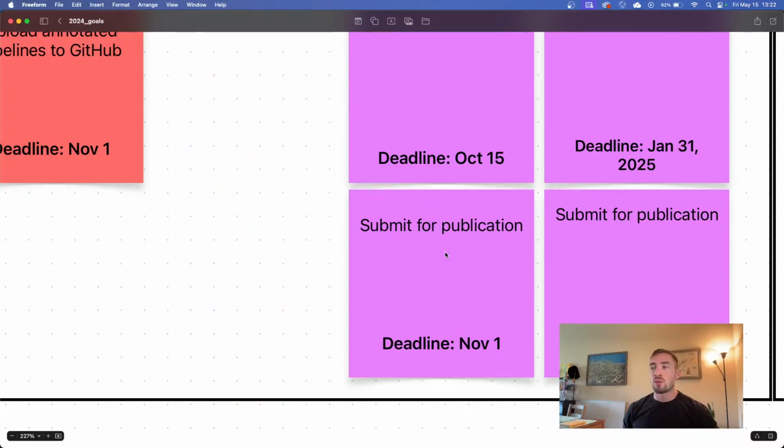But what's great also about deadlines, if you start the planning process early enough, is you can adjust as things go. Once you start diving into the tasks that you have, then you can realize, oh, that was too much. There's no way I'm going to be able to do it. And you can adjust accordingly. If they are hard deadlines set by a grant funder or a government report or something, that's a little different. Those are a little harder to get away with.